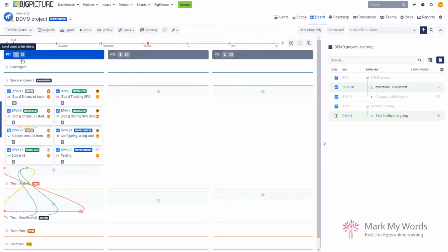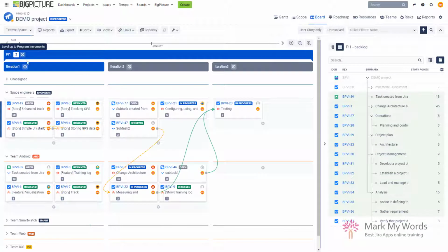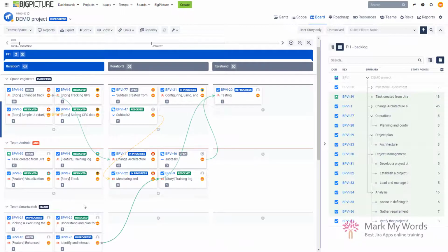And of course, you might be thinking, well, I can kind of do this as well in my Jira view. Sure, you can do it in your Jira as well. The problem that you have in Jira is that you usually have one board per one team. Over here, you can have one board per multiple teams, right? And also you can create dependencies on that board, right? So I can say that this task is dependent on this task, and that creates a dependency, which is a very quick way for teams to identify what might be causing problems between their scheduled workload, right?